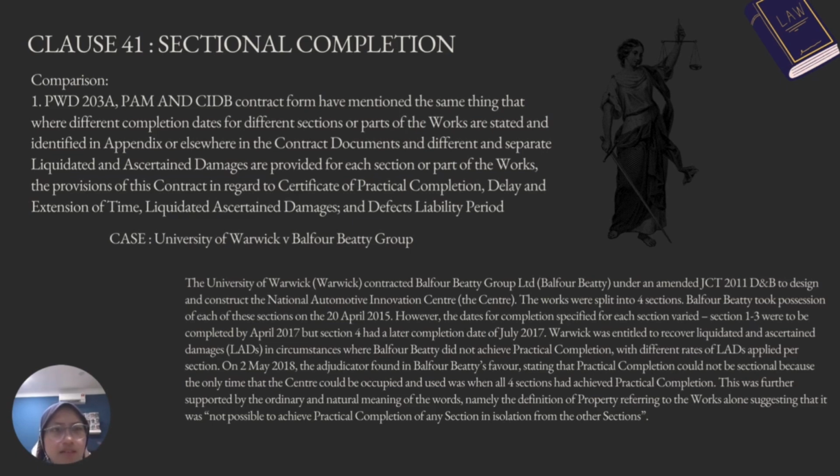For the case related to this clause, University of Warwick versus Balfour Beatty Group. The University of Warwick contracted Balfour Beatty Group under an amended JCT 2011 D&B to design and construct the National Automotive Innovation Centre. The work was split into four sections. Balfour Beatty took possession of each of these sections on 20 April 2015. However, the date for completion specified for each section varies. Sections 1 to 3 were to be completed by April 2017, but Section 4 had a later completion date